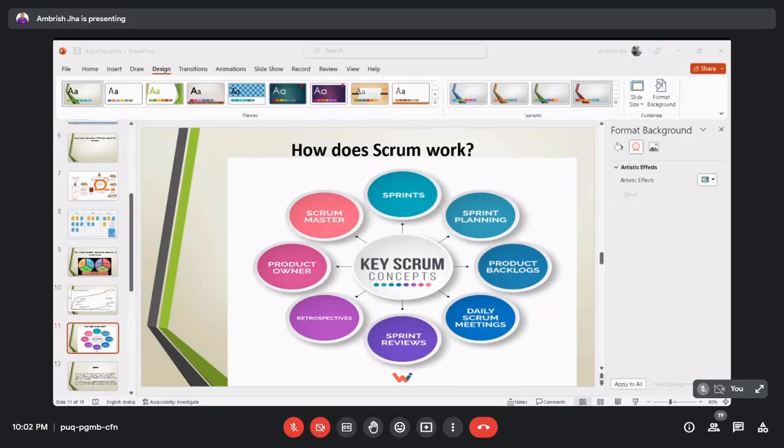So we have talked about the sprint. Sprint is a 2 weeks time in which we have defined level of efforts, our bandwidth, how many engineers, how many hours they will work in the upcoming 2 weeks. That is called bandwidth. And how much task we will complete, that is known as the goals. So these three things, level of efforts, bandwidth, and goal statements, make a sprint.